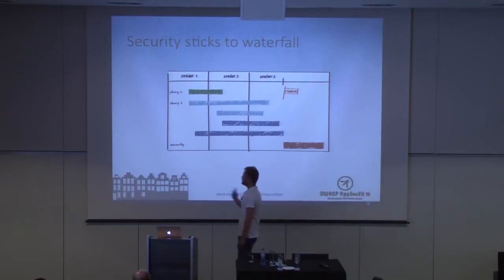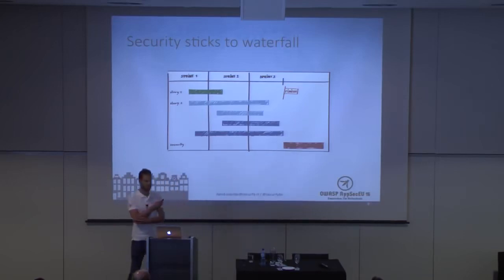So when you combine these two, you get this. You have your Agile development team committed to a bunch of stories. They work their ass off to get things done, to have it all packaged and patched and ready to go to production. And then they are blocked by security. They need to do an intake, probably wait about 3 weeks for the pen test to happen. This pen test will probably take a week.